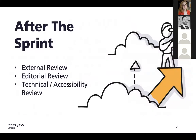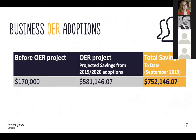Following the completion of the sprint, there were additional tasks to complete for quality assurance. We had an external faculty member review all the material, had an editorial specialist make edits for consistent tone, completed technical aspects such as ensuring the test banks work in all major learning management systems, and completed an accessibility review of the slide decks. In the end, the project was a complete success. We are pleased to announce that the development of these resources has resulted in additional adoptions across six different colleges, totaling over $580,000 in projected savings for the 2019-2020 academic year. In total, business programs have saved Ontario students over $750,000.